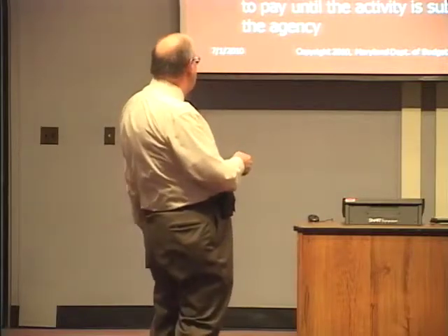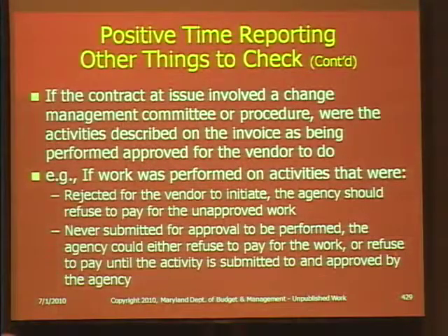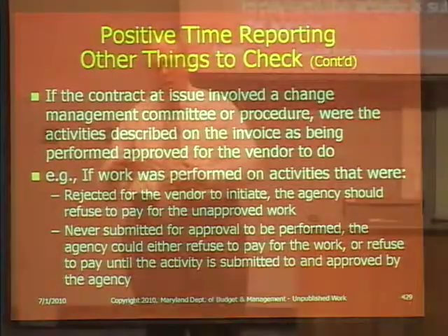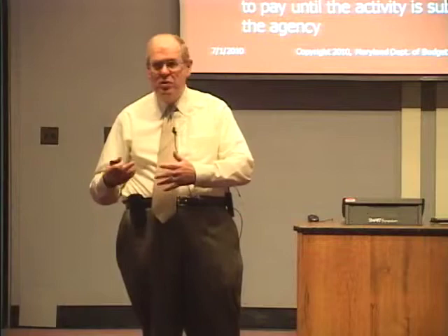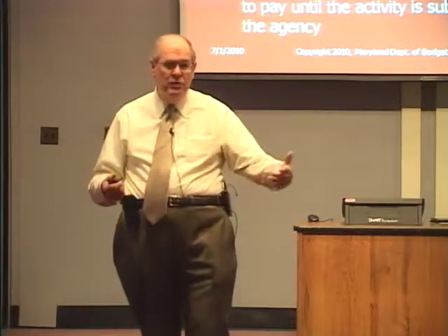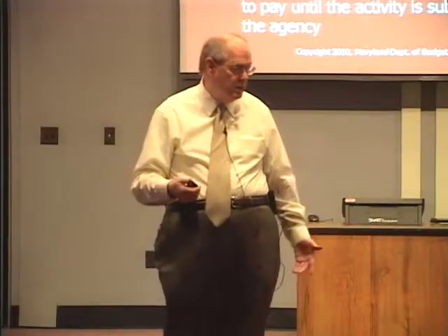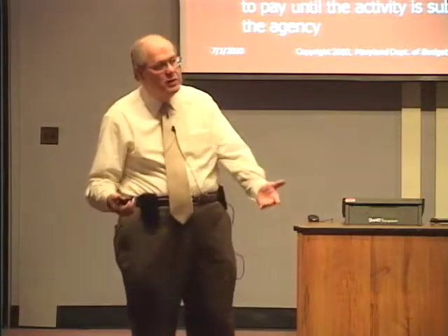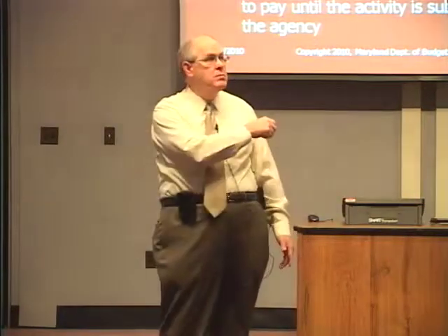If they never submitted it for approval for something they were required to, then it's the same thing. You refuse to pay for it until they submit it to the appropriate change management committee and get approval to do it. If they don't get approval, they don't get paid for the activity that wasn't approved, which you don't know if you don't get this additional information.